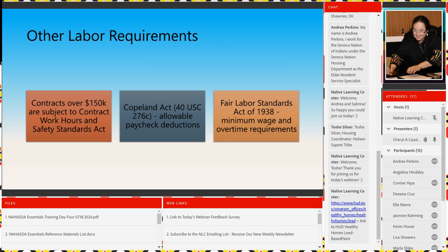In some cases, they're already meeting that wage rate. But you have to go through and identify that it's a Davis-Bacon project. They have certain steps they have to take. They have to ask and request those wage rates, or you do it through sam.gov. Sometimes they're paying more than that, but sometimes they're not.